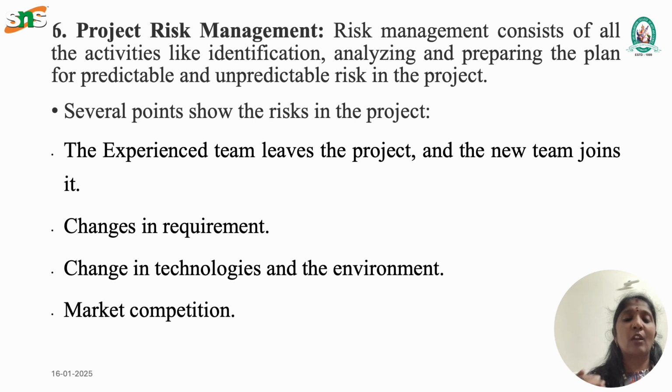If any experienced team member leaves the project, or any new team member joins, then you can have some small risk. If there are changes in the requirements, then also the risk might be there. If there are changes in technologies and environment, then you have some risk, and market competition is also one of the important things. So these are all the small risks that may arise, so we have to analyze and plan accordingly.